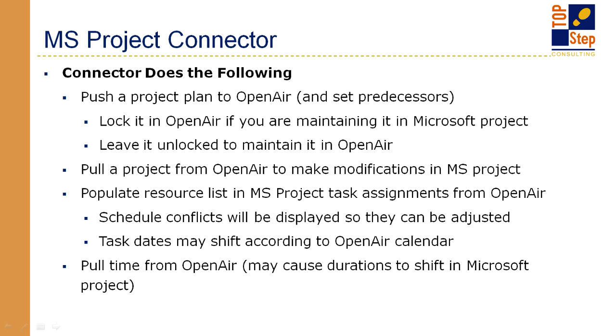And you can also pull a project from OpenAir and make modifications in Microsoft Project if that's where you're going to manage it. And you can populate your task assignment. Scheduling conflicts will appear so that you can make those changes. You can pull time from OpenAir into Microsoft Project, because OpenAir should be where all of the timesheet data, time is entered, time is kept.